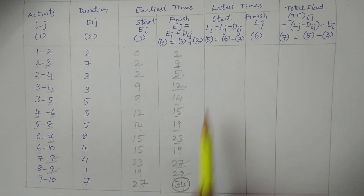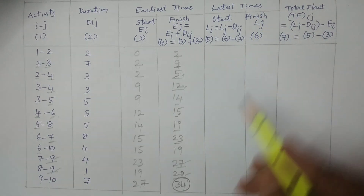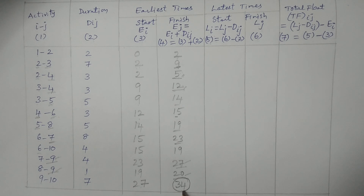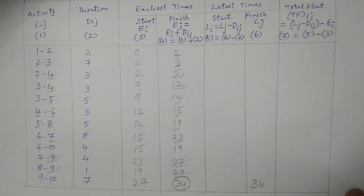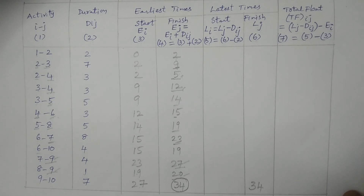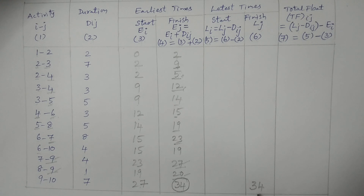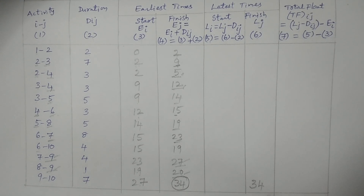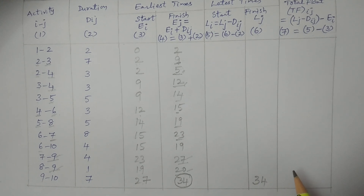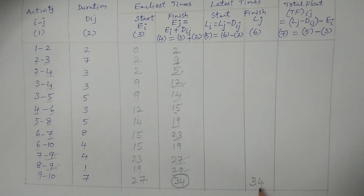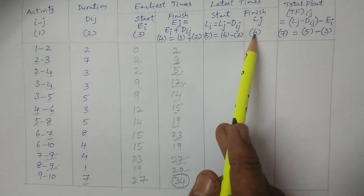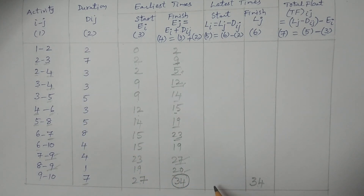Now it is time to calculate latest times. For the last event, E equals L. We consider the last value as L: the last event value is 34. Remaining values are obtained by subtraction. 34 minus 7 equals 27. For node 9: L9 is 27. For event 8 to 9: j equals 9, so it is 27. 27 minus 1 equals 26.